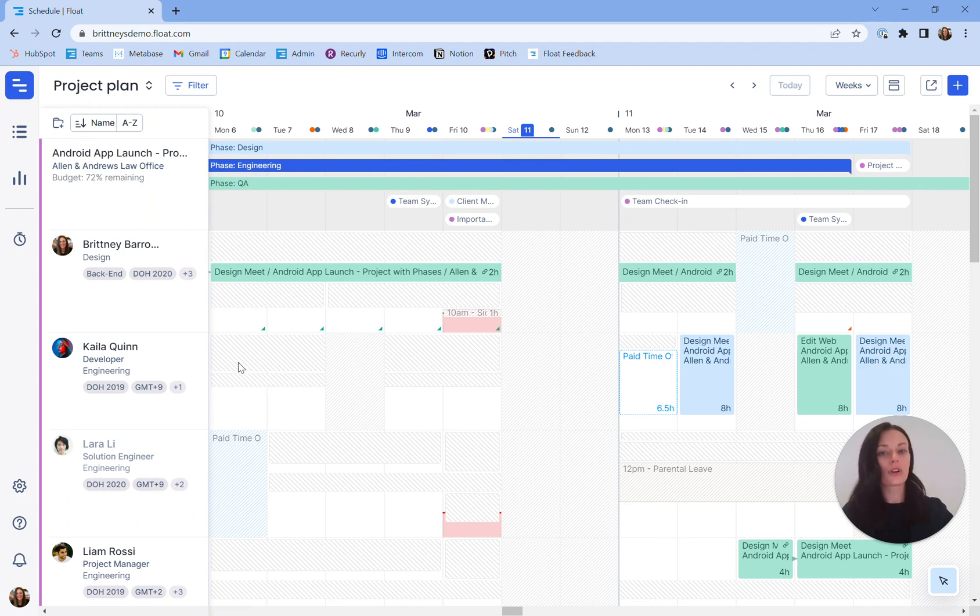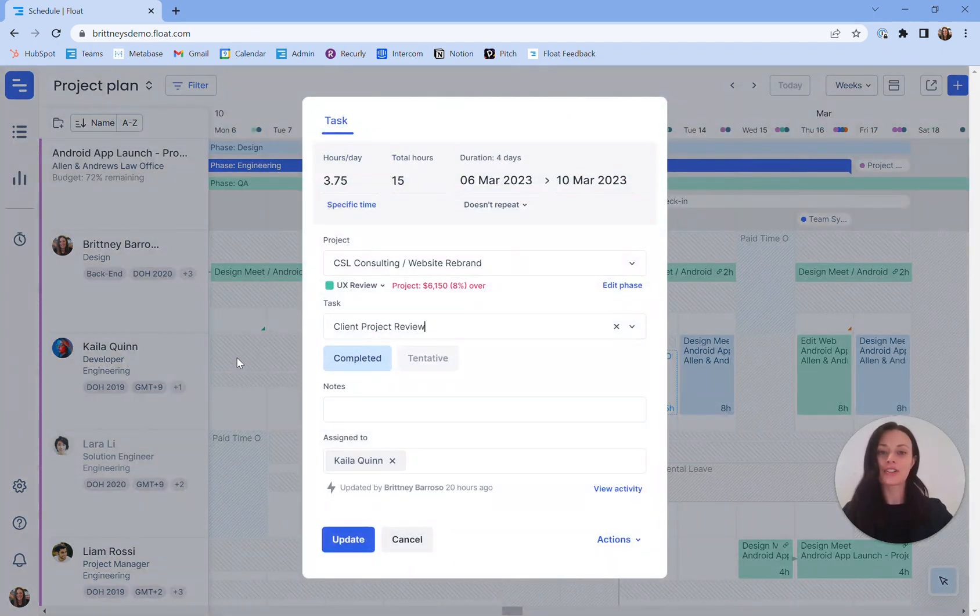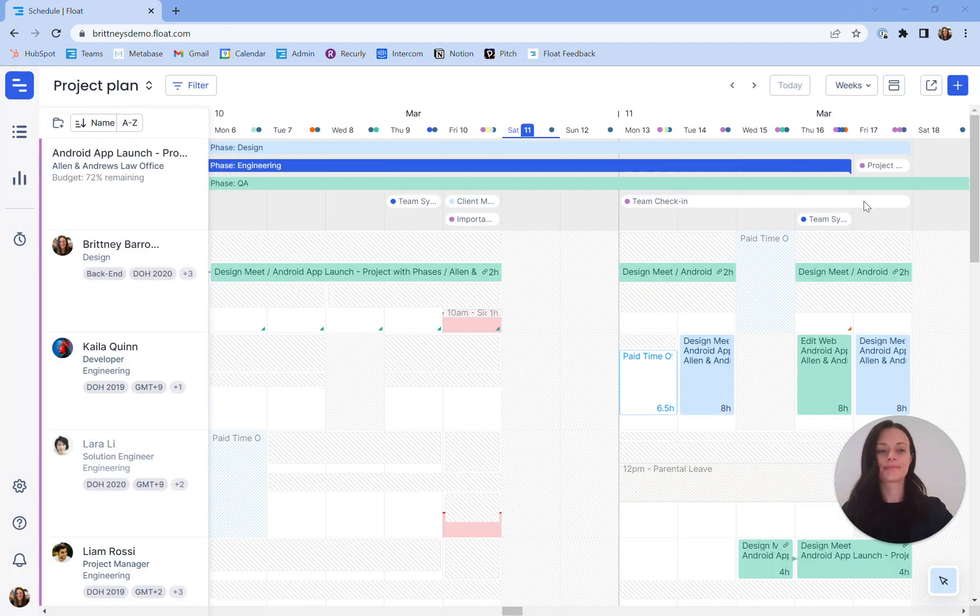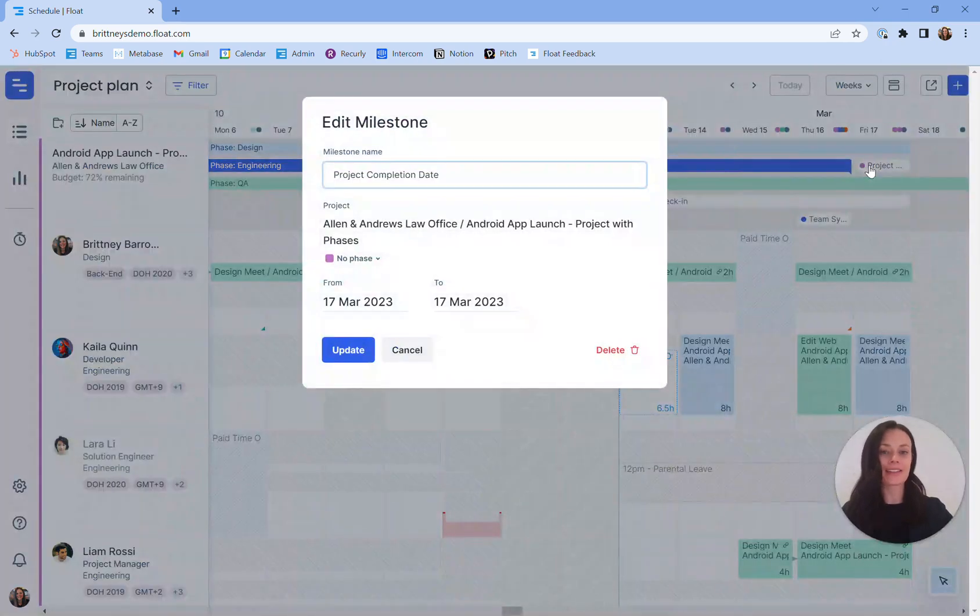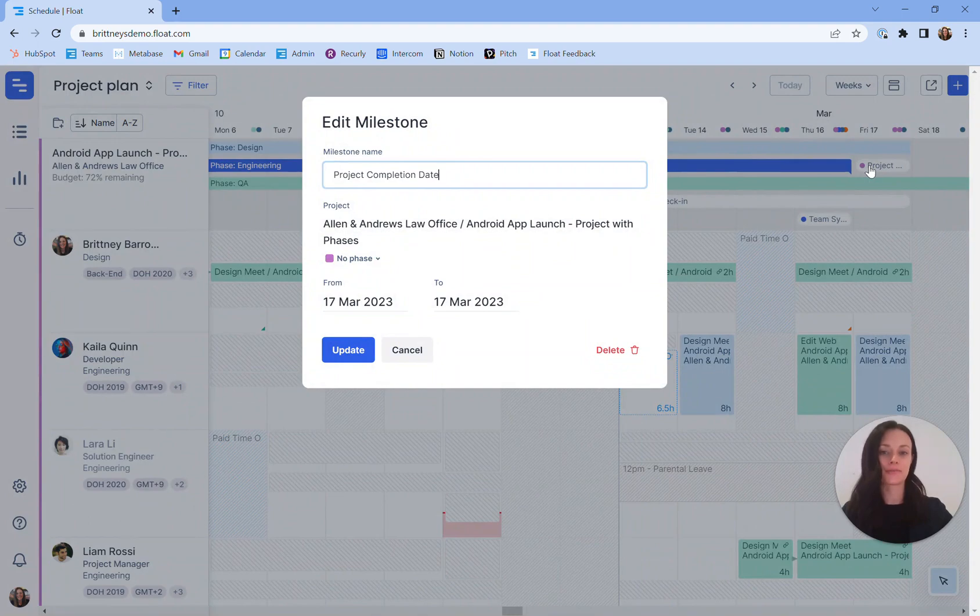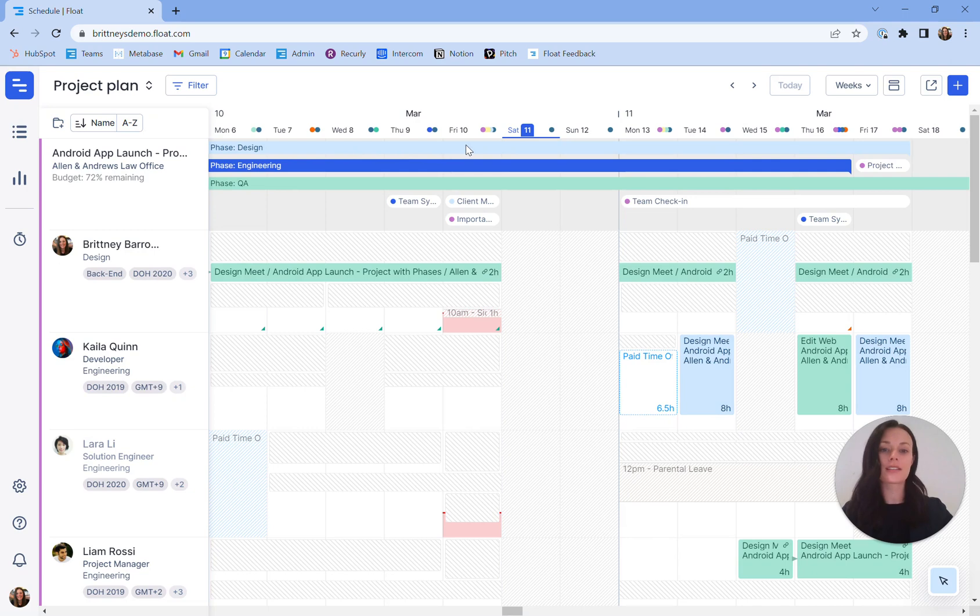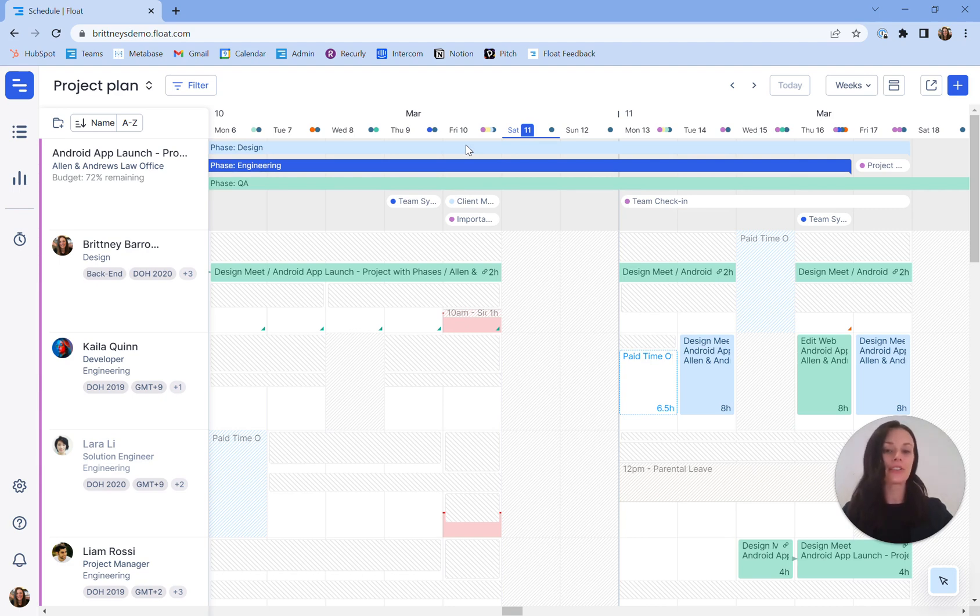You can hover over or click a cross-line task to see this information and make changes to it. Milestones appear across the project name on their assigned dates. They can be added and edited directly on the schedule just like any task can by clicking into the milestone. Phases appear to the right of each project and will run alongside the project throughout their duration. You can have overlapping or adjacent phases and phases create group dependencies so milestones and tasks can actually roll up to a specific phase and you'll be able to adjust that phase by either clicking directly into the phase or dragging and dropping the phase.